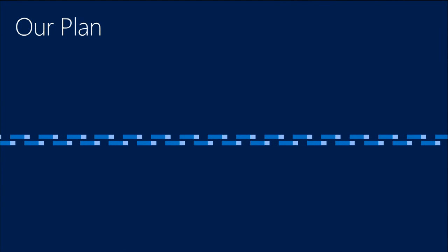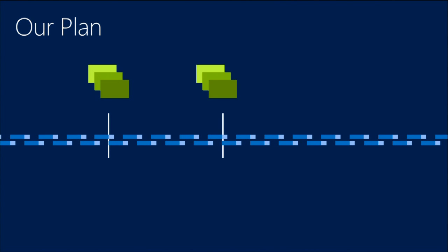And then if you step up one more level, what we do every 6 months is we create what we call a half-year plan. So we kind of break our years up into a spring release, which is really January to June, and a fall release, which is July to December. And we have these themes for the spring release. We'll have a goal for the spring release. So for example, one of the goals for the spring release was Git support. Like that was one of the big goals.